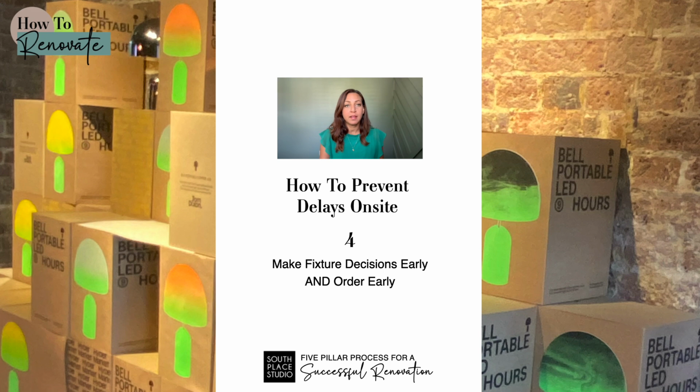Because if you make these decisions early, then you will know when to have your items on site. You will be ready when your contractor asks you for the items. And again, they don't always give you enough time to get everything on site. If you have to decide, order, pay, and get everything to site in time for when they need to install it, usually they ask last minute.